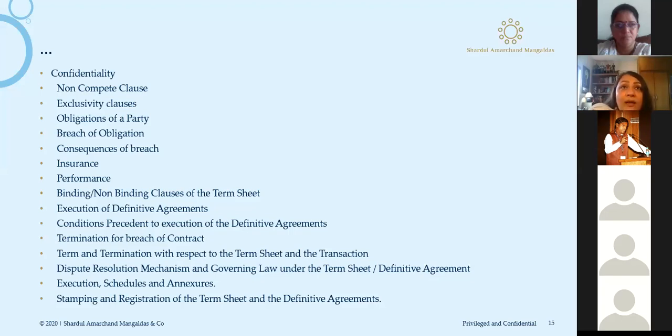Second thing is, where is the title of the property moving? For example, if it was a factory. You have contracts where you must decide where the delivery is going to happen, and where the title is actually going to be transferred from one party to another.